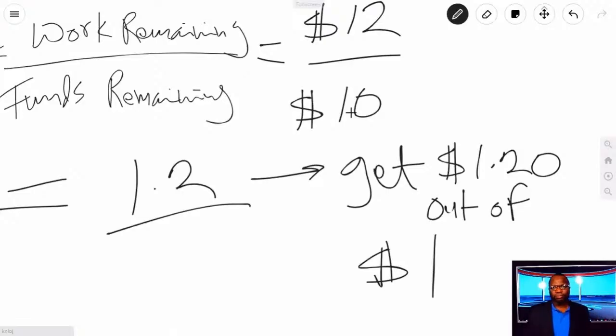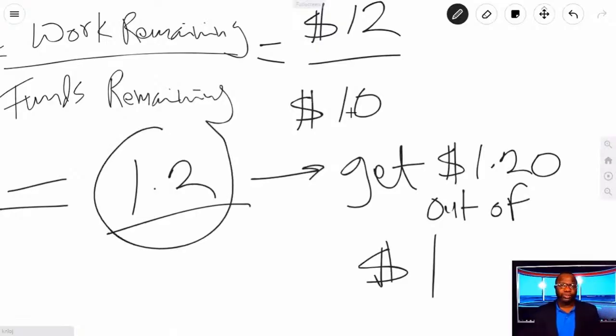Think about it. Management might push back and say, that's not achievable, you're lying. Especially if you say, oh, I'm good, and they ask, what is your TCPI? And the TCPI is found to be 1.2. That 1.2 tells them Phil's not going to make budget.